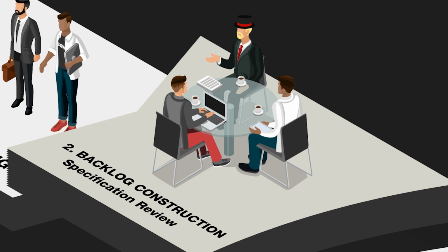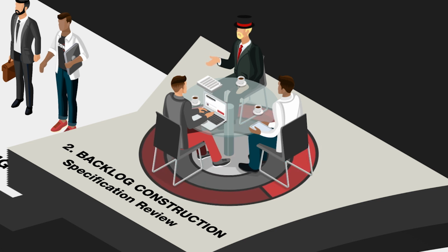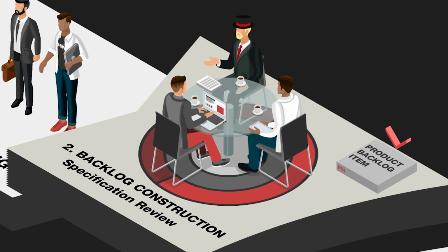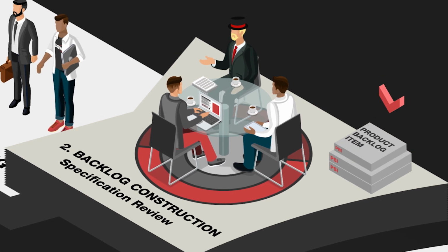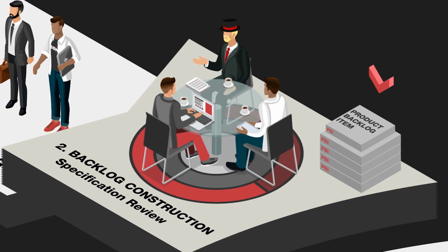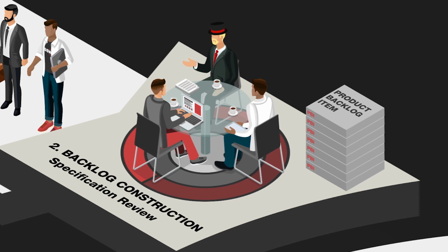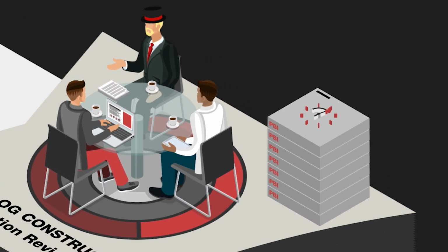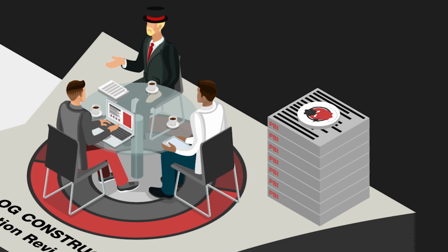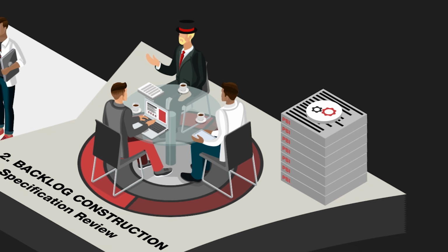The developers work with the product owner to create a high-level software architecture to achieve the vision. The required features are broken down into product backlog items, or PBIs for short. These PBIs combine to form the product backlog. A product goal is also defined at this point, so the whole team can be working towards a common long-term goal. These PBIs are estimated, and before a dollar figure is presented, a buffer is added for other tasks such as DevOps, testing, bug fixes, and project management.